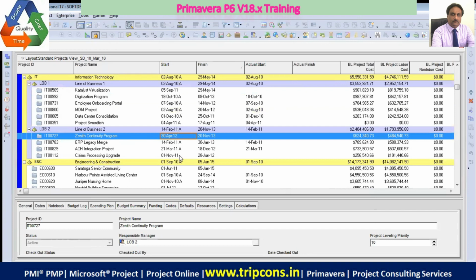So when A is indicated, it means that the project has started and some actual project execution data has been captured and compiled. So you can be sure that this project has started and some of the tasks have been done, so that actuals are there. So actual time, actual cost, actual work effort, that has been captured.